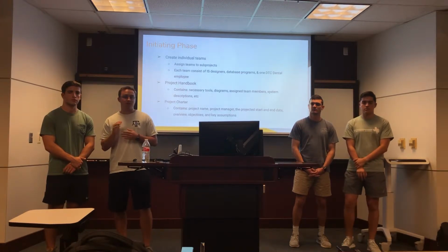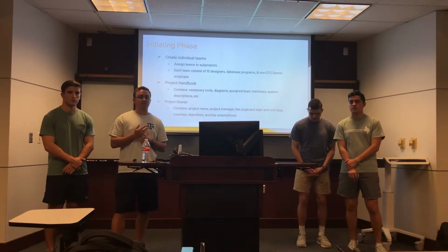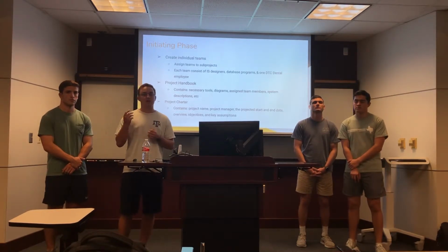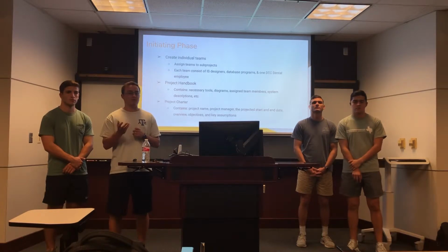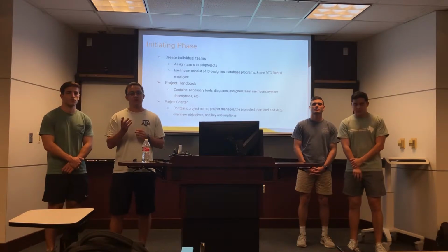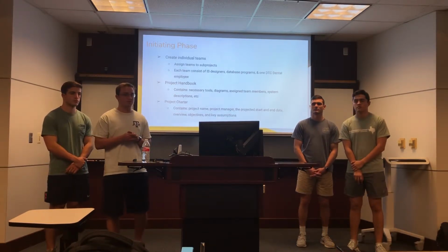And then finally, we will issue the project charter, or in other words, the contractual agreement with you, DTC Dental. This will cover the main project manager of the whole project, the start and end date for the project, any assumptions we need to know about, and of course the requirements that y'all want us to meet by the time the project is completed.